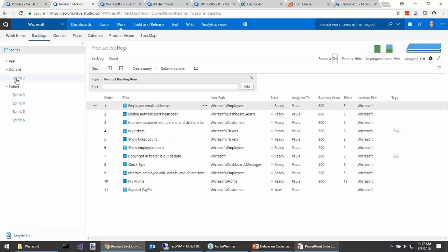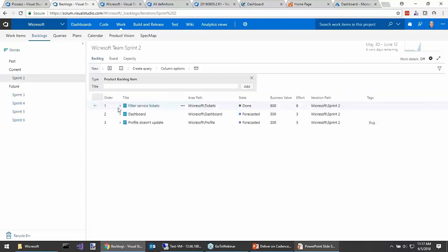I'm going to fast forward this and go into sprint 2. We've already got a backlog created here. We've pulled in these 3 product backlog items that the product owner wants, 8, 3, and 5, so about 16 points. Here the dev team forecasts that they can do this amount of work, given all kinds of factors: given that maybe they're down one coder for this sprint because that person's on vacation, given that the World Cup starts next weekend and some people are going to have a lot of, quote, sick days to watch their favorite team play. It's the dev team that creates the forecast.